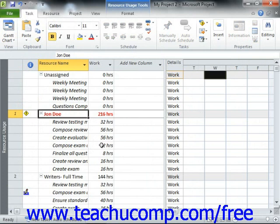One way to change resource allocation is to manually change the hours assigned to the selected resource, or to add additional work resources to the tasks to which the over-allocated resource has been assigned, thereby reducing the hours for the selected resource.